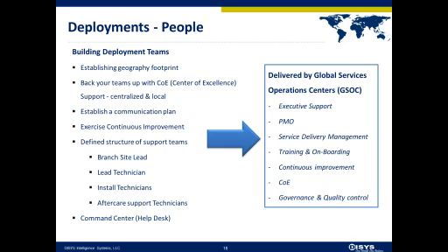We'll have a technical project manager that is over the entire program at a program level. He'll go down to the leads at each one of the locations if the footprint's large enough to demand that. And then we'll have a lead technician with the install techs, and then the aftercare support, and then a fallback to the command center to handle the volume and influx of calls, which becomes very important because the